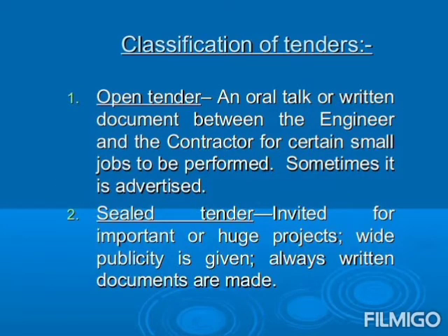Classification of tenders. Open tender. It is an oral talk or written document between the engineer and the contractor for certain small jobs to be performed. Sometimes it is advertised. Sealed tender. These are invited for some important or huge projects. Wide publicity is given and also written always in documents which are made.